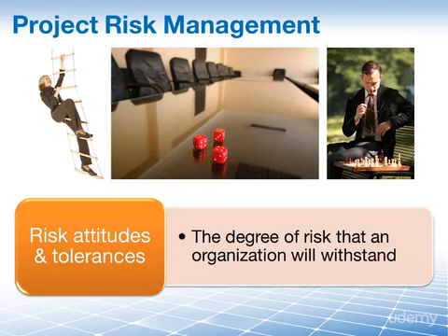Now remember, an organization as such, as an entity, doesn't really have risk attitudes or risk tolerances. It's the people working in the organization that do. So we're really talking here about the risk attitudes and the risk tolerances that the stakeholders on your project will have. They will influence how we plan and then later on also execute risk management on our project.